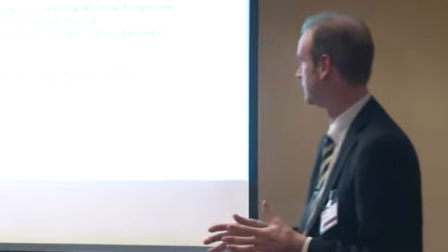And the NEC form of contract actually provides for float. It provides a project float, which is generally owned by the project. And it's available to whoever gets there first. It can absorb delays by either the employer or the contractor. But crucially in the NEC, there are two other forms of float. Time risk allowance. Time risk allowance is the amount of additional time you allow for risk to carry out a particular activity.